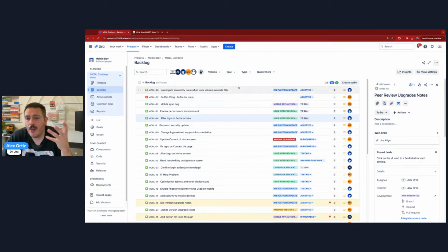This is a negotiation between you and your Scrum Master, and I would even say your technical leads, where you look at every story and you validate: is it still relevant? Has anything changed since the last sprint that we need to update? Because having a plan that we had a week ago, 2 weeks ago, a month ago is awesome, but so many things change on a weekly basis, on a daily basis, heck, even on an hourly basis, sometimes information can change.